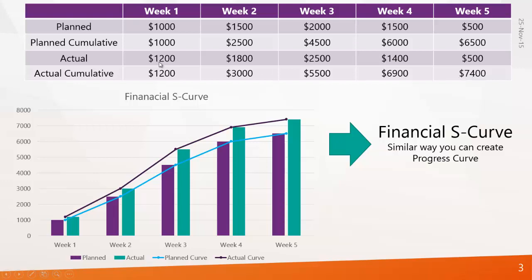When you create a graph based on planned cumulative and actual cumulative you are generating an S-curve. Here you can see the curve — on the x-axis it is showing the time, week one through five, and on the y-axis it is showing the cost, from $1,000 to $8,000.